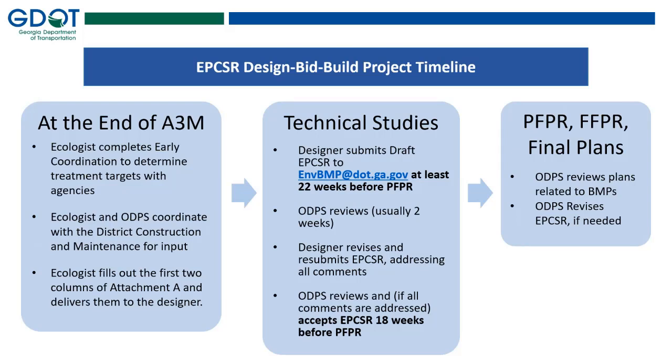After A3M, there are some projects with tons of resources found during the survey, say over 100 resources, but ultimately that's our survey boundary, and we do want to focus in on the, say, 30% of those that may actually incur impacts, rather than tasking engineers with every water that came within 100 feet of a given project area, or whatever your ESB boundary is.